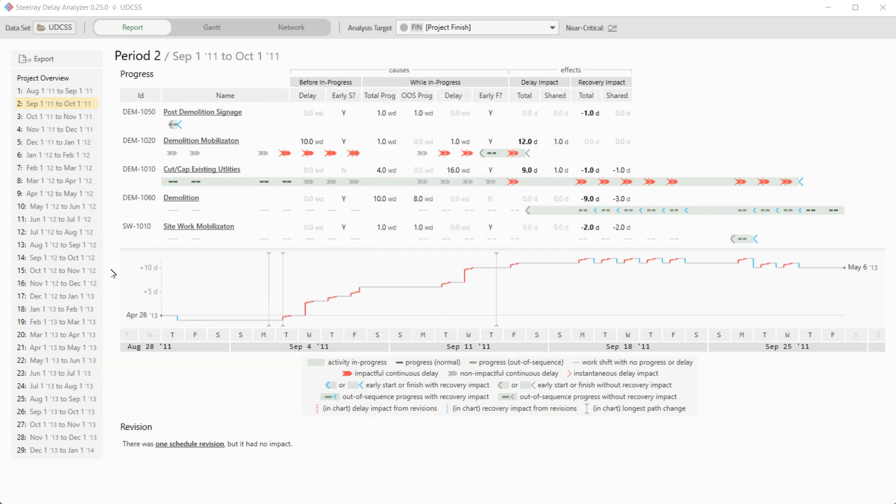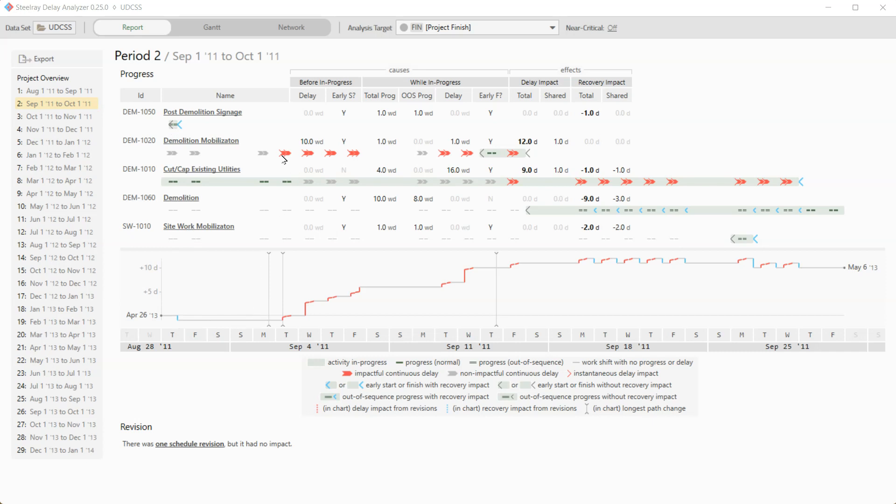You can also see that there's a bottom part of this graph as well. And what this is doing is this is showing you what was happening to the finish date over time. And so sure enough, you know, it looks like there were no delays on any of these days. In fact, our finish date, because of this early finish, it recovered a day. And it wasn't until demolition mobilization started delaying that we see the impact to the finish date.